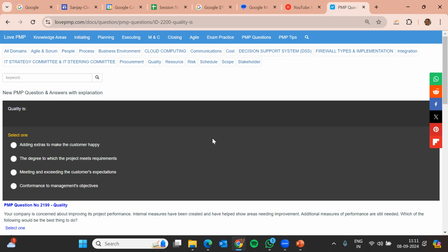First one. Deepmala, you are clearly dropping it. But Deepmala, you can't do it silently. You need to tell me why. Why are you dropping it? Because extras will not add quality. Exactly. Extra is not quality. In fact, Deepmala, this is a crime in our language. In project management terminology, this is a crime. They call it gold plating, and gold plating is bad.